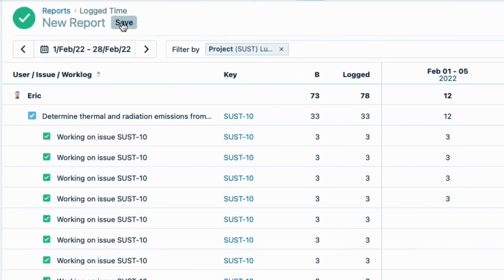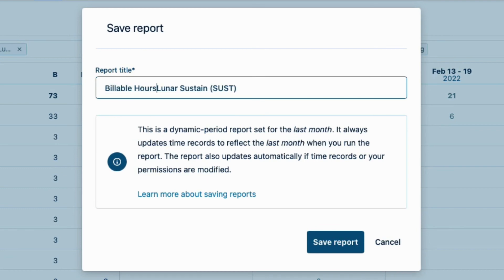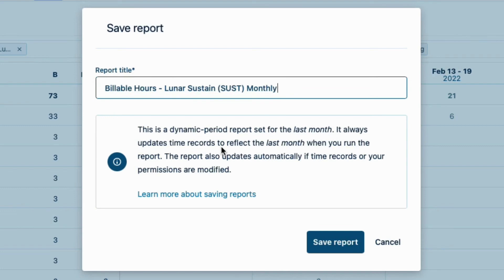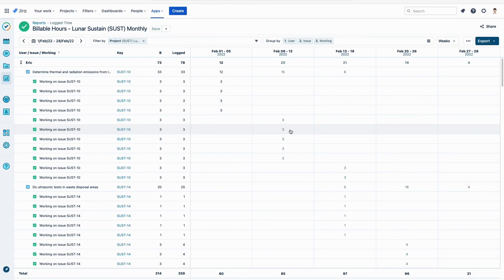Now I'll save this billable report to keep this data the way that I've set it up. So, I click Save up here, and change the report title to Billable Hours Lunar Sustain Monthly. A note reminds me that this is a dynamic report for the last month. Dynamic reports make it easy to create templates since the data is always relative to the current date. So, I can simply run this report every month without having to set it up each time. And that makes my life easier. I'll click Save Report, and I'm all done.